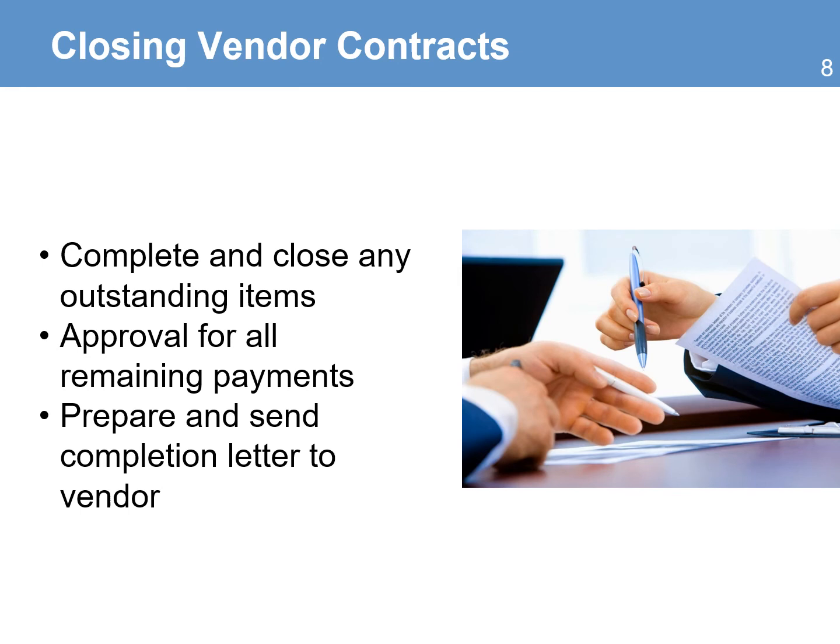You also need to complete and close any outstanding items that were open during the life of the vendor contract. You should only approve the final payment when the deliverables have been accepted by the project. It is also important for the vendor or consultants to have a letter stating that the services provided to the project were completed as expected.